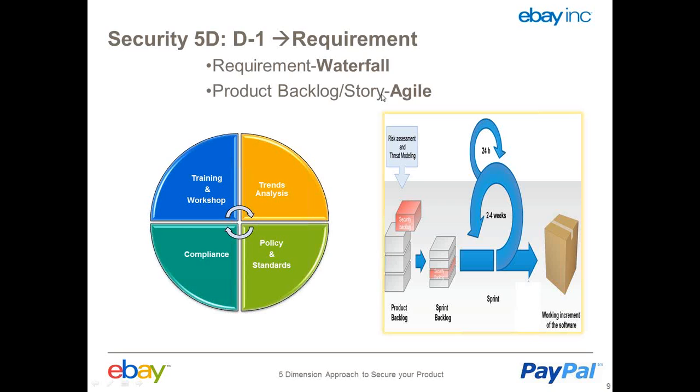As I said, your security should be your backlog item, starting from the product backlog. Whatever kind of system you develop, it has to be grounded in security in some way, either in terms of data breach, credential breach, or even financial breach. So at any point of time, for any requirement in any product backlog, security should be a part of it, and having that as a separate security backlog will help you very conveniently.